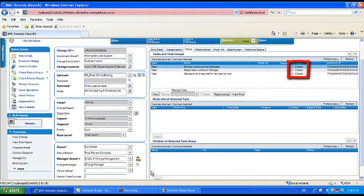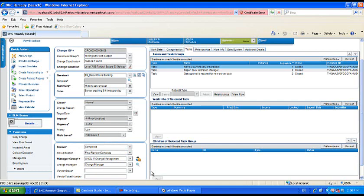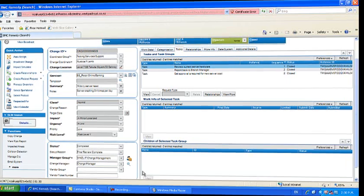Once all tasks have been closed and saved, the change request is automatically set to completed. The change request is still in implement stage. It has a status of completed and the status reason of final review required.